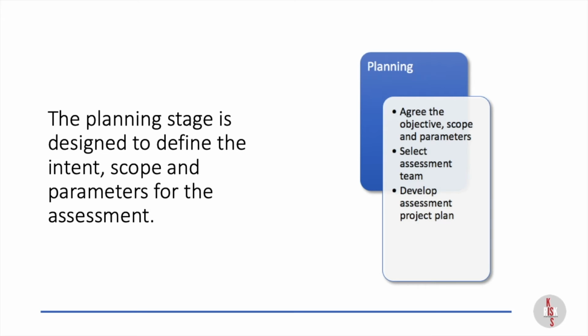And what we need to do at the end of this is develop a small project plan. For a large assessment, it could be a big project plan, but you really just need a basic project plan. What's the intent? What's the scope? Key timings, key resources available, and when the deliverable has to be prepared and delivered. And with that plan in place, what you can then do is start scheduling things. You can start planning things in more detail.